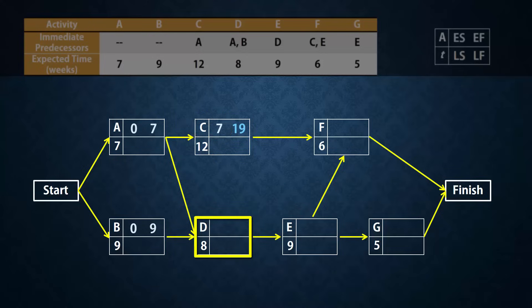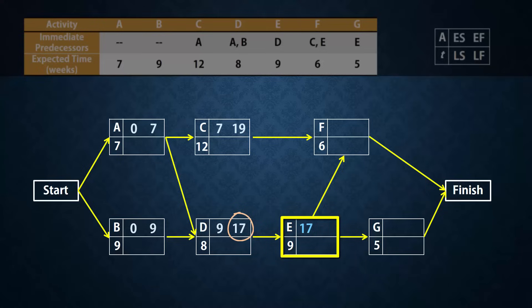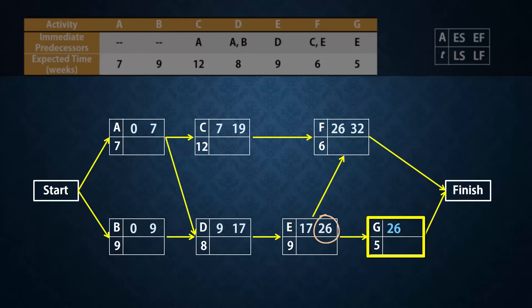D needs both A and B to finish before it can start. Since the earliest finish times for A and B are 7 and 9 respectively, and D needs both of them to finish in order to start, the earliest time D can start is 9. The highest of the earliest finish times preceding an activity will be the activity's earliest start time. So D finishes at 8 plus 9, which gives 17. E has only one predecessor D, and so can start at 17 and finish earliest at 26. F has predecessors C and E. Since the higher earliest finish time is 26, F can start earliest at 26 and finish at 32. G also can start earliest at 26, since it has only one predecessor E, and G can finish earliest at 26 plus 5, which gives 31.